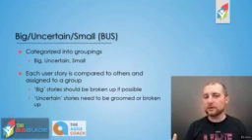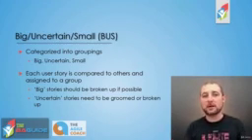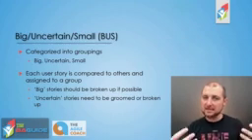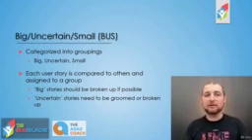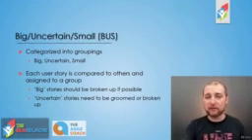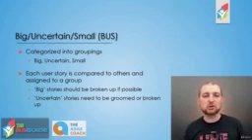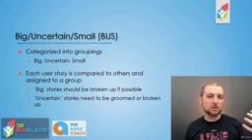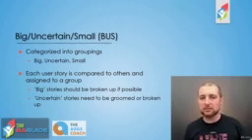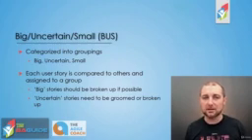Now, with any of the stories that are in the big bucket, the first thing you should try to do is break them up. Is there a way that we can take that existing user story and break it up into multiple user stories, ultimately parse out that user story, and then have those be estimated as small? That way they're bite-sized, they're easy to complete and provide value. Not all big user stories can be broken up and still maintain the same amount of value delivered to the stakeholders or the users in this case. So some of them will stay big, but you do want to make an attempt to break up as many of those as possible.